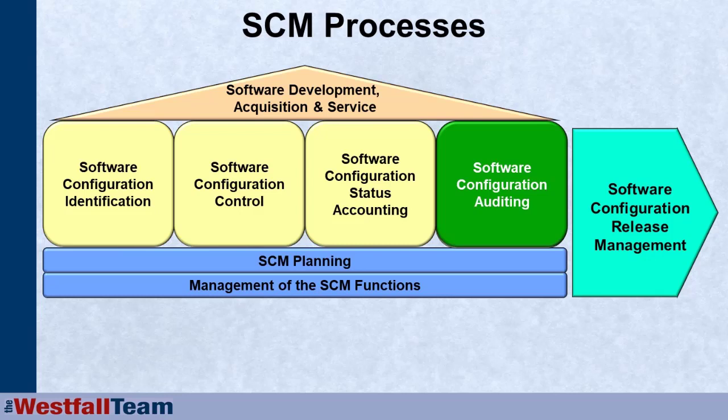There are four major functions of configuration management. There's the configuration identification, where you identify what you are going to put under control, what level of control each configuration item will be under, when you're going to acquire it, what your baselines are going to be, and when you create those baselines. What criteria your configuration items and your baselines need to meet to be brought under control.